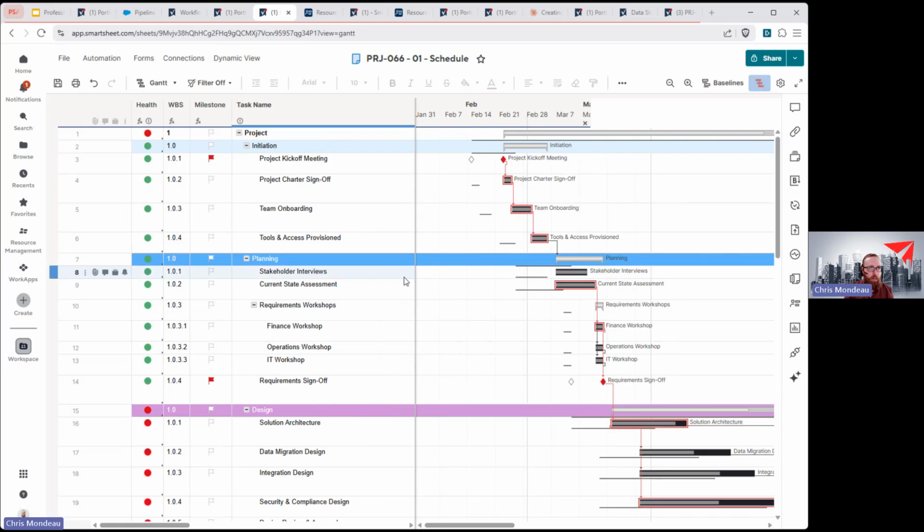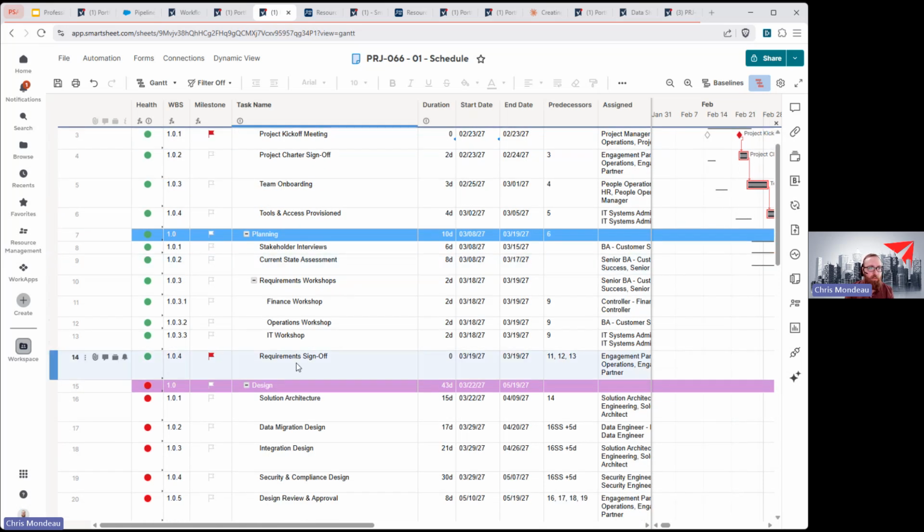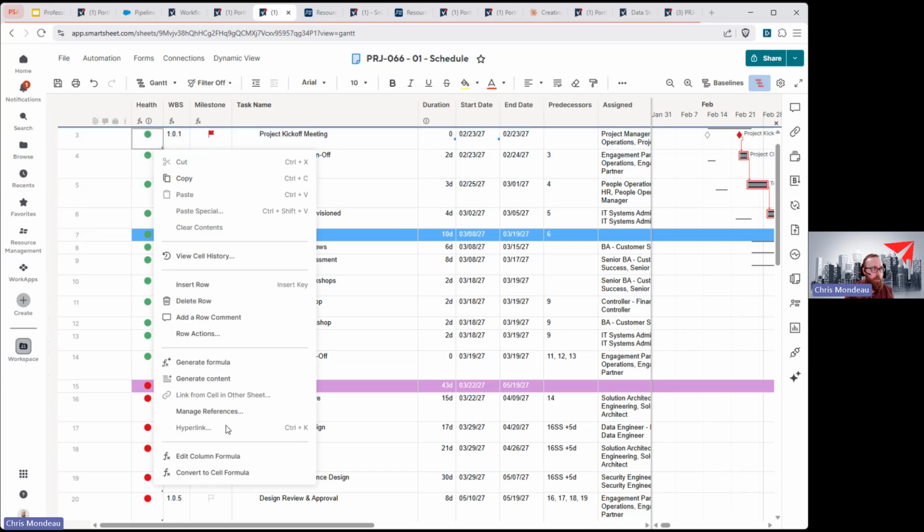So I said I'm going to come back to resourcing, and really that is tied nearly exclusively with everyone's favorite, project schedules or project plans. So from my initial template set, I built out a generic project engagement where I'm tracking things by the major phases. Some of my deliverables, my specific milestones, sign-off elements, establishing predecessor relationships, etc. Here's my health formula. I'll make sure to get a copy of this for folks so you can see this function here.